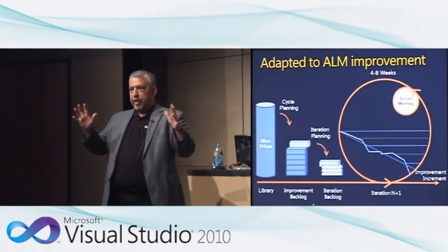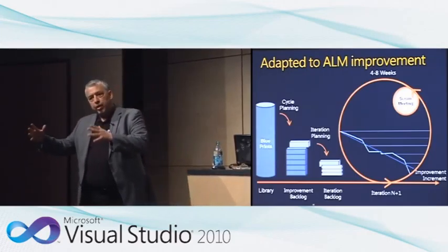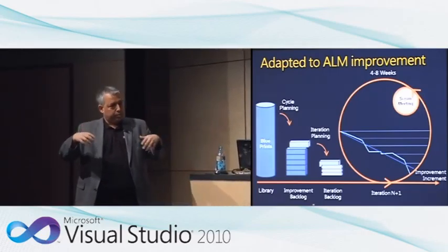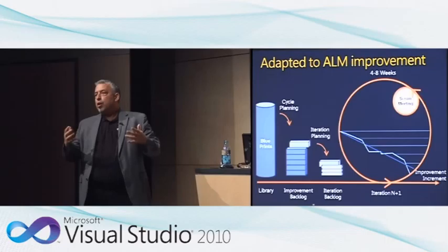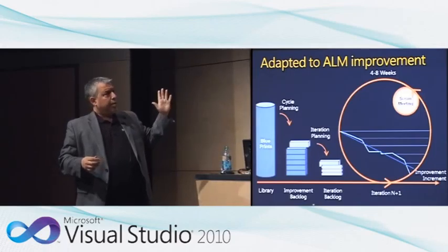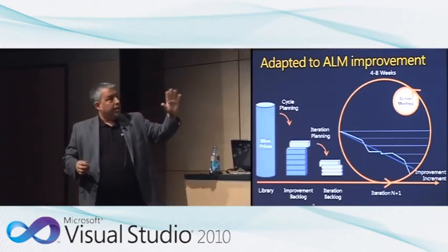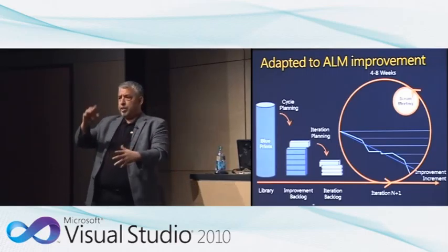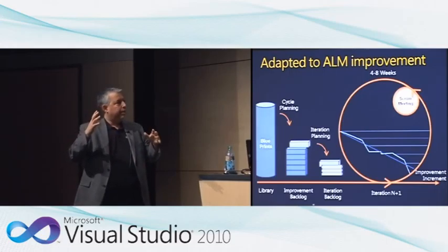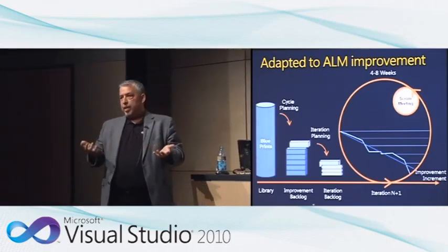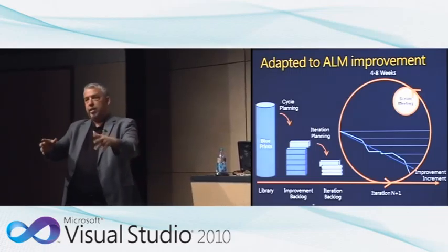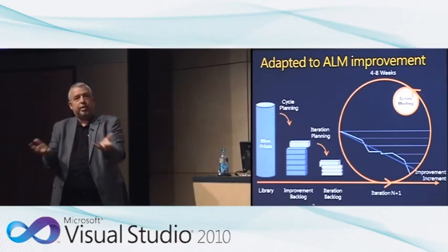So when we look at saying, okay, we're doing process improvement, how do we apply the Scrum principle to that? We had to adapt it a little bit. So look at what's the principle behind all the components of Agile and find the equivalent for these types of projects. Again, we have the same traditional approach where we have an improvement backlog. And the difference for us is that instead of the PBI, instead of user stories, what we have is improvement items. So the concept is basically an improvement I'm doing for one given team at one point on one practice. So that for us is an improvement item.